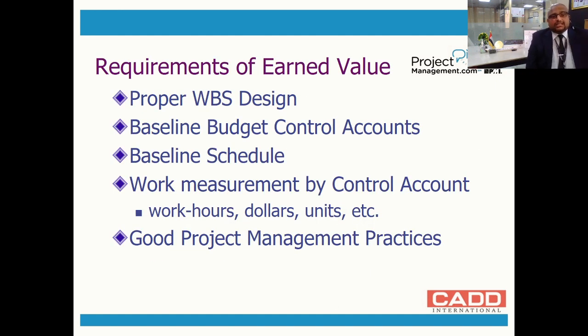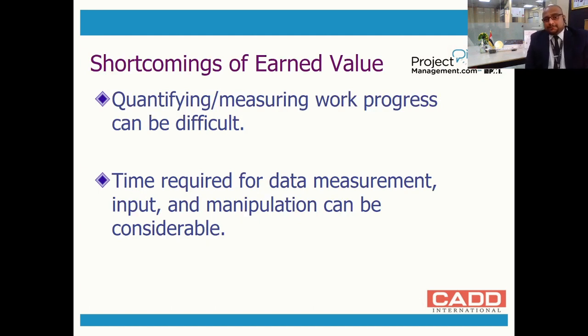Requirements of earned value analysis, to summarize: you have to have a proper WBS design, proper baseline budget, proper baseline schedule, work measurement by the control accounts, and good project management practices. This is what is required for the implementation of earned value analysis. Of course, it has got shortcomings also. So what are the shortcomings?